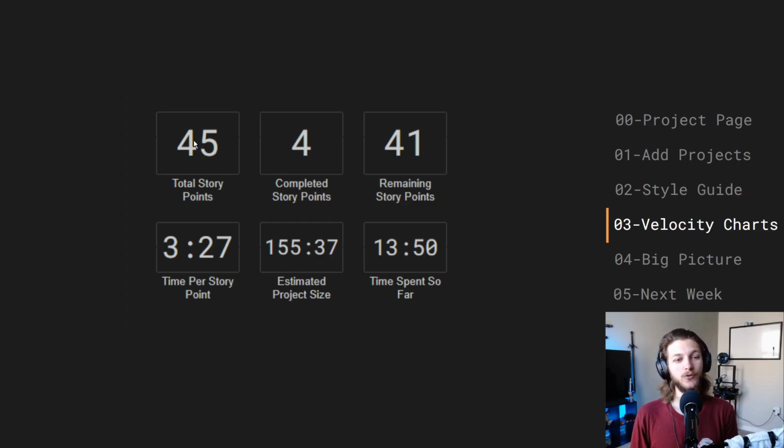But we can say right now our total story points is 45. We've completed 4 of them, so we have 41 left. Pretty basic math. We can see that it's taken me about 3.5 hours per individual story point for the basically 14 hours I spent last week. So we're estimating, based on this, that the project is going to take roughly 150 hours, roughly 155 hours.